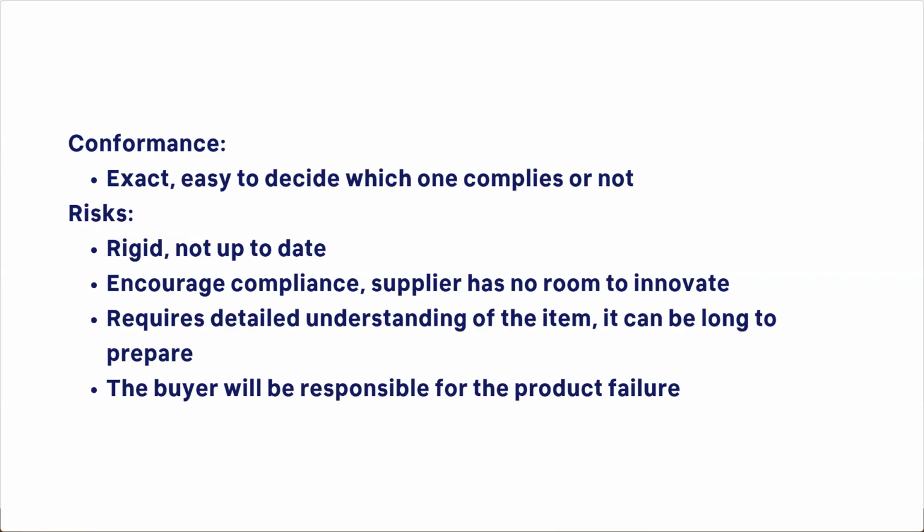The conformance specification may include some technical details or some standards, but however, it could be quite rigid, and especially when you refer to a standard, it may not be up to date. It may encourage compliance, and the supplier has no room to innovate.